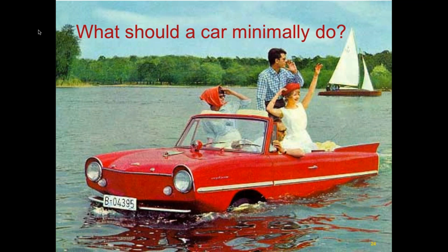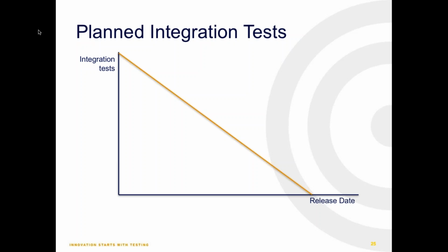And so I made some end-to-end scenarios, and I spent a lot of time trying to find out what the interfaces were between the different teams and the different systems. And I came up with 40 different interfaces. So I could clearly state that if the interfaces were not working, thus if they were not tested, then the end-to-end scenarios were most likely not running end-to-end, and then we had a problem. So prior to running the end-to-end tests, I could say we need to plan some integration tests, and we can make a burn down chart where we say, when is the integration tested?